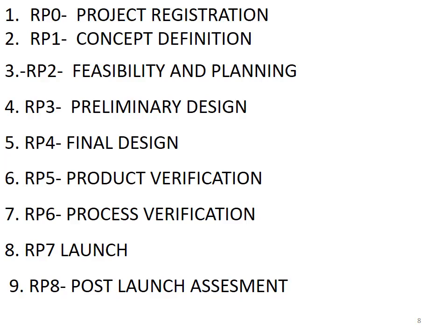Create phase in and phase out plans. Create functional specification and performance metrics. Review concept selections. Define product architecture, assess technical failure modes, and create preliminary test plan. Then we go for the preliminary designs.